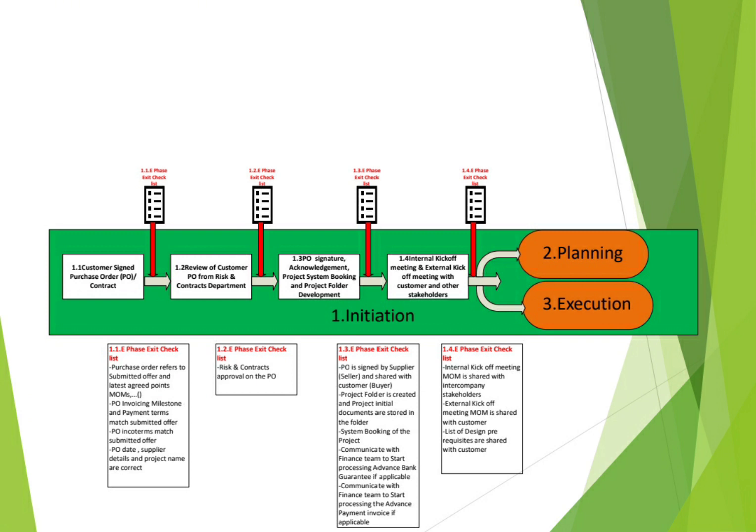We'll go through the purchase order quickly, highlight the milestones mentioned by the customer, agree who will be the technical lead for this project, ensure the project manager for this project, and so on. So this internal kickoff meeting is very important. Also, we'll discuss with your sales any agreements, any minutes of meeting which will be part of this contract. We need to take care about something. All of this will also be gathered in the minutes of meeting of this internal kickoff meeting.